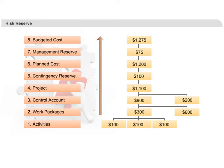There can be multiple control accounts in a project. Once the project cost is calculated, some reserve is added to take care of any uncertainties. This reserve is added because you might have made some assumptions to calculate the cost of the activities, and by adding some reserve, you want to take care of those uncertainties — accounting for known uncertainties. This reserve is also called contingency reserve.